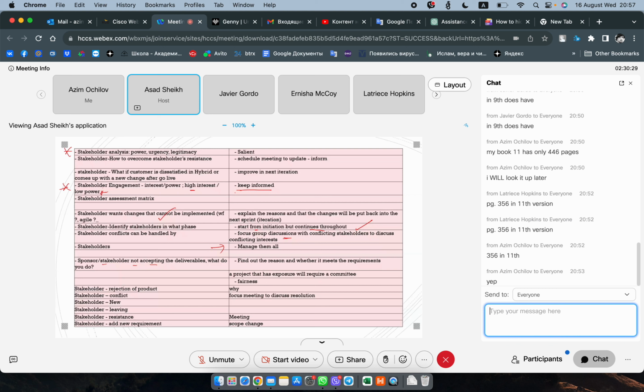If they're not in the requirements, that means those were new changes, right? But if they were in the requirements and we didn't give it to them, that's our problem. That's the team's problem. Then we've got to fix it and satisfy them. But in this case, they asked for a couple of things that were not in the requirements. So we were sort of safe, because we just did what we were told to do, what was in the requirements.